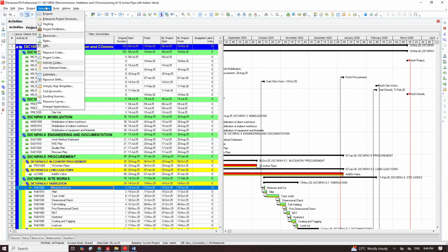That's what we normally hear, right? So now all you need to do is as simple as ABCD. First thing is, if they are going to produce that item for you, please tell them to give you a schedule. A schedule is a way of getting them committed. Anything you are doing with somebody and there's no laid down process, no expectation, no timeline, the person will end up doing it when he wants.